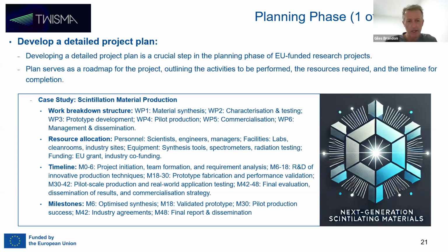And in the context of a project dealing with development of scintillation materials, especially one about production and some sort of commercialization, broadly speaking, the work packages might look like this. There might be work package 1, dealing with material synthesis, work package 2, more about the characterization and testing, work package 3, prototype development, work package 4, the pilot production, and then work packages 5 and 6, about commercialization, dissemination, and project management.